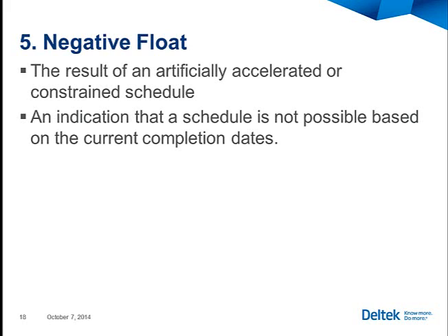If you have a baseline that has negative float, that means you are literally planning to fail. Now you'll have the PM, program manager, who says, well, we have to turn it up. We have to turn up the heat on this project. We're being challenged. We need to get done on time. That's why we're going to have negative float. To me, that's the wrong answer.